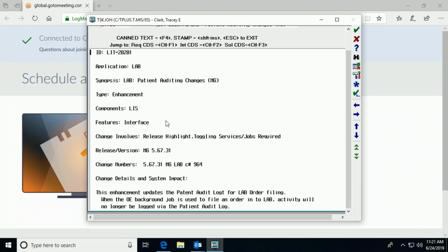So if you're trying to organize your testing, and I know that's a radical concept, instead of just taking the DTSs in numerical order as presented to you, you might say, well, I really want to focus on a feature, like I use the example in pharmacy of the dispensing machines. If I'm testing in pharmacy, maybe I have a particular person in mind who's really good with the dispensing technology. So I'm going to hand over those DTSs that have to do with dispensing to that person.